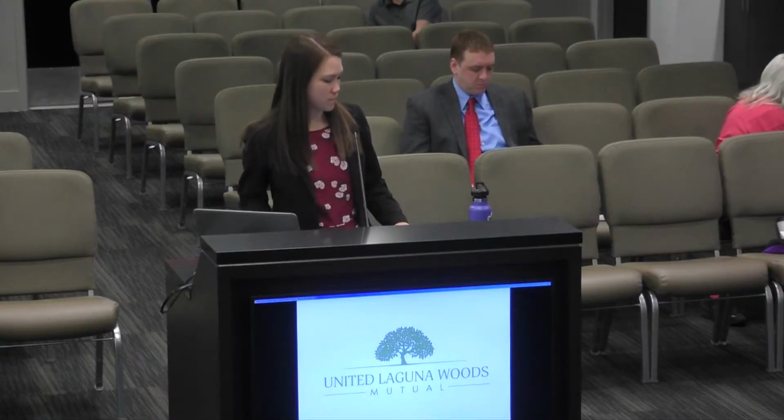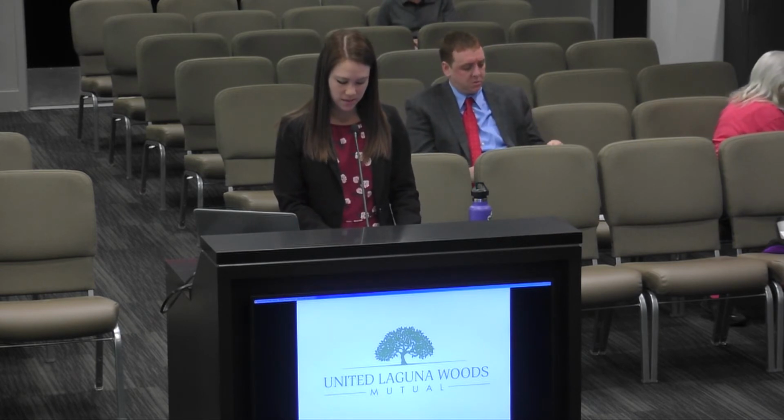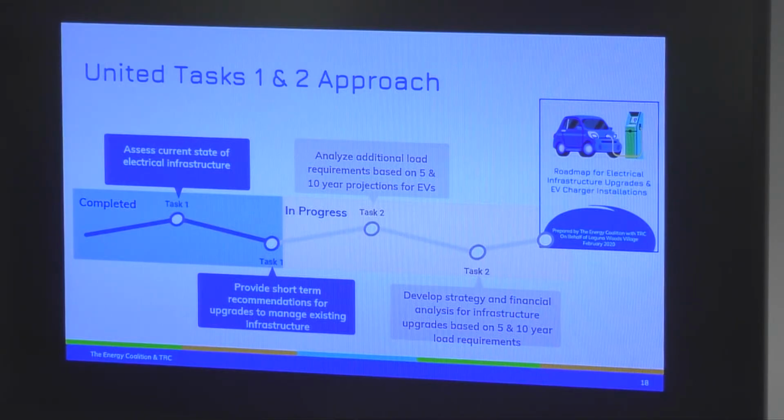All right. So we just reviewed the Task 1 activities. We collected data to assess the current state of electrical infrastructure and developed a report to provide recommendations for upgrades to manage the existing infrastructure. So now that we've reviewed the infrastructure for the current state, we would have baseline information to analyze the upgrades necessary to add additional load across the next 5 to 10 years. After completing analysis on load requirements, we would develop a strategy and financial analysis for infrastructure upgrades and then develop a report. In the next couple of slides, I'll dive a bit deeper into the Task 2 scope and a high-level outline of the report elements.